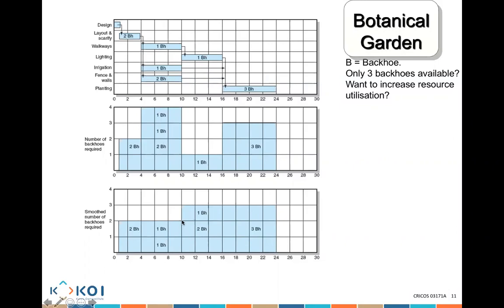So you see how it's more balanced than 2, 3, 2, 3. You're using 2 for an extended duration, then you increase your usage by 1 person for the other duration. Otherwise, you use 2, then 3, then 2 again, then 3 again. It's not balanced. Okay. Make sense, Ujwal?